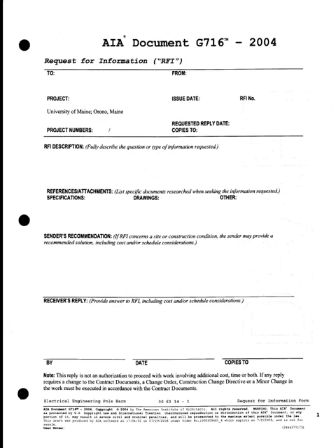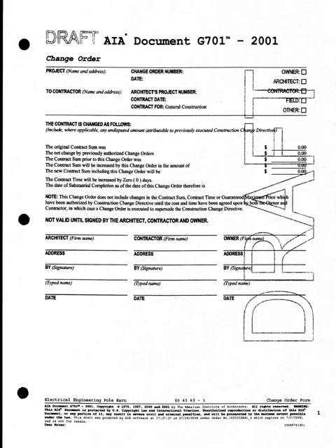More information, more AIA documents. I'll flip through this as quickly as I can. Work change proposals: if there's any changes during the job, they'd fill out this particular form. It really doesn't do them any good, but our accounts people, our contract people will not accept anything but these forms when they send them in, even though they need to pay for them. If they send us just an email that says I need a change order on this, they have to fill this information out to make it work.